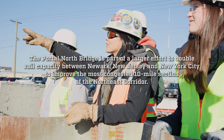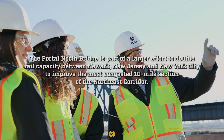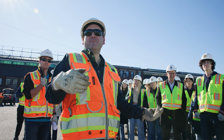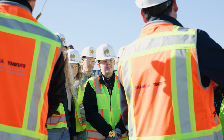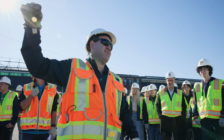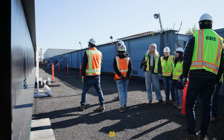But we need the same support for you guys. So then the next one's like, our strategy is to get the girders sent from the two fabricators we have, sent here, 2 miles away from the site. We'll pair them up, do all the bolt up on the pair, put the electrical conduit on the fascia girders. We have to put our sidewalk brackets for the concrete deck to go on, and then we will truck the pair over from here to the job site.